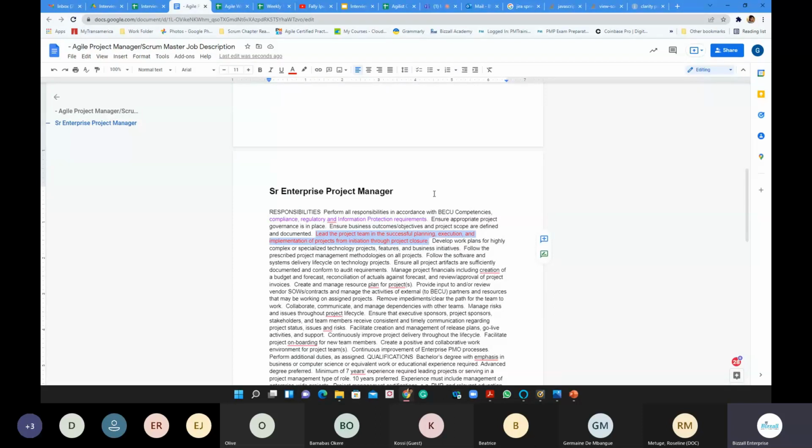What are they doing that for? Who are they doing that for? You want to understand who is going to be the end user. What are they even doing that in the first place? Are they trying to sell something? And what is the speed of selling? What is the condition in terms of processing payment in the website? You agree on that before you even give them the cost. That is initiating. When you initiate, you put that down, you create a project charter, then you kick off the project.